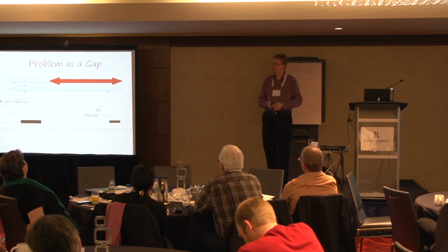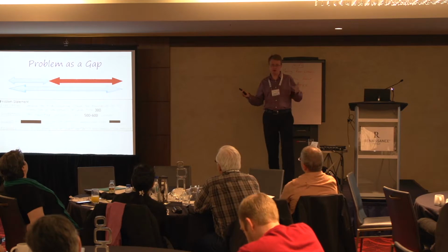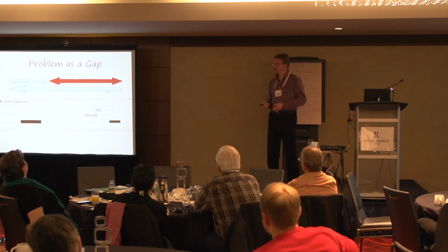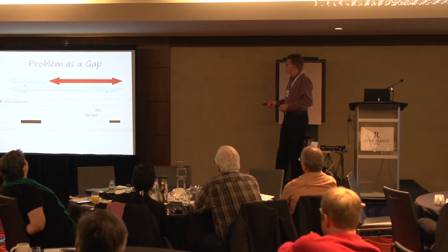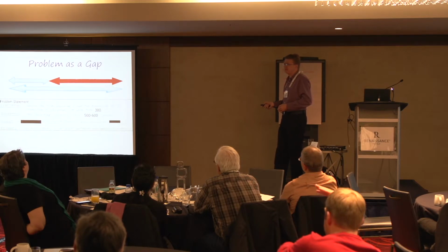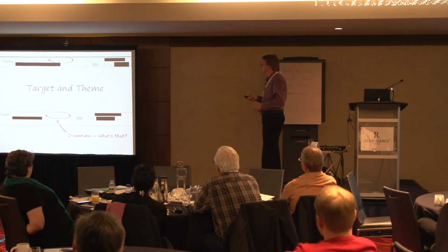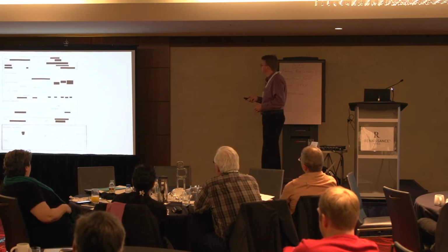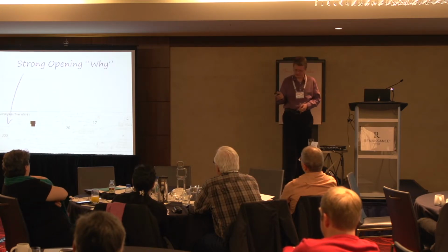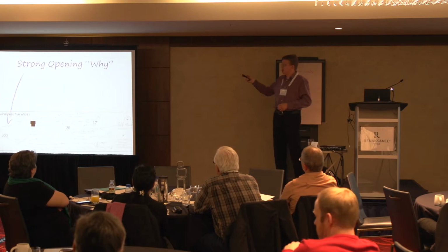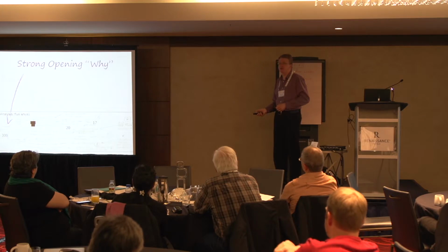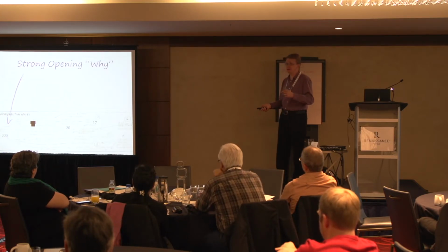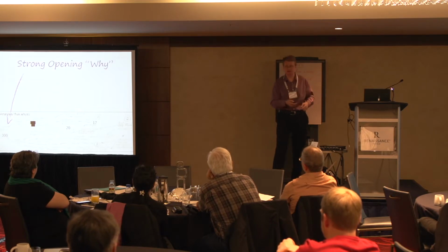So, for example, there is some expectation, such as the talk takes about 60 minutes, right? And then there is the reality, which is that it takes 78 minutes on average. And so the problem is the 18-minute gap. And defining the problem like this, let me go back to this, go forward to this, gives us a very strong opening why. So why the gap? Why does it take longer? And then we can play the game of 5 whys and try to get the causes of that.